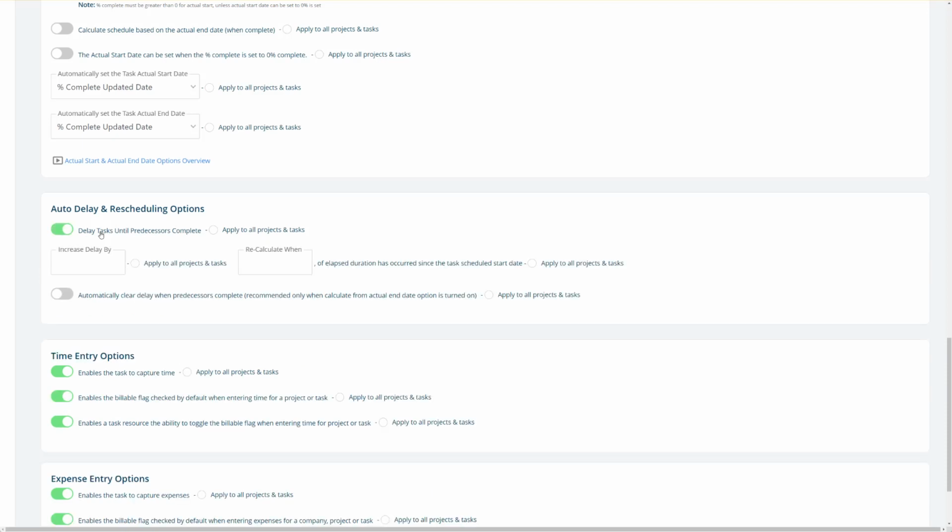In this video, I'll explain the auto delay and rescheduling options. What this means is that you can set the system to push or delay a task if the predecessors are not complete. In here, you'll check this box and then you can say we want to increase the duration by 1 day when one elapsed day has occurred.